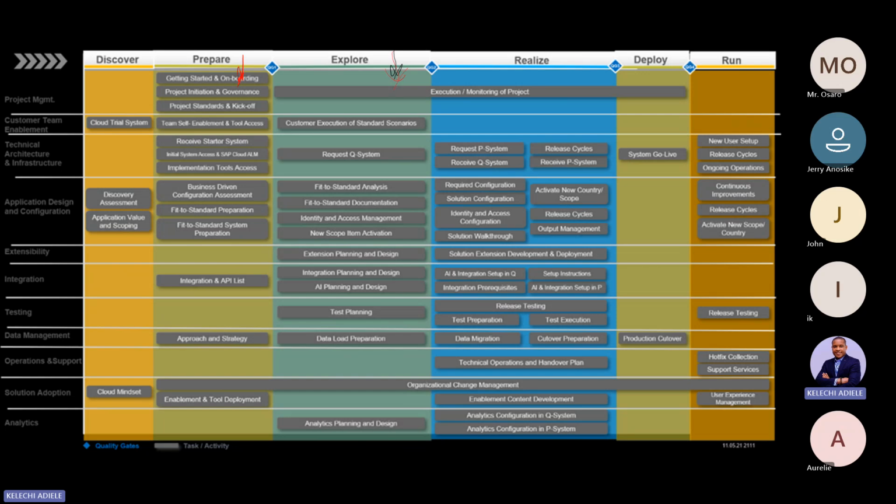And so scoping is a major activity that has to happen with the support of the BA, and you can only scope when you understand the methodology you're going to be using and the activities that happen in these different phases. A project manager might decide to use a traditional approach, he might decide to use agile. Whatever approach he's using, he must break down that large project into actual tasks and assign timelines and resources to them to be able to really come out with a scope. And that's one important thing we're going to be doing before we end this session.